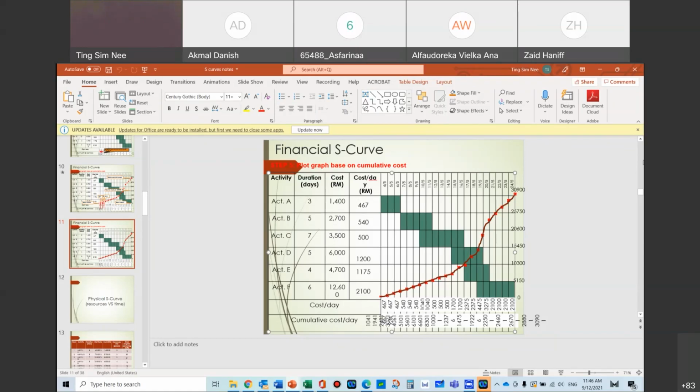Okay. And when you are a contractor, you don't base it on the tender price lah, you will base it on your own budget, meaning that for this work, before you key in any margin or anything, the cost really is the cost of the work. That is from the contractor's perspective. I'm actually talking about the contractor, supplier perspective now. Just now I was talking from the client, the EV technique, from the entire project client's perspective in that sense.